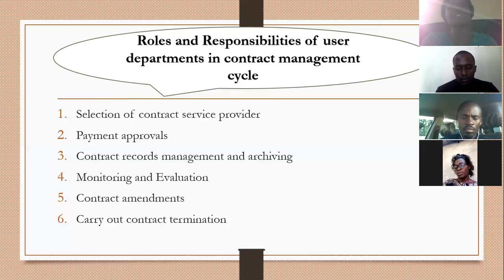But it's very important that the payment should comply with the budget lines that have been approved, and the money should be readily available on the project account, or the local government account, to kickstart the provision of that particular contract item.